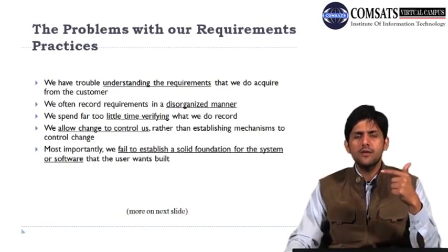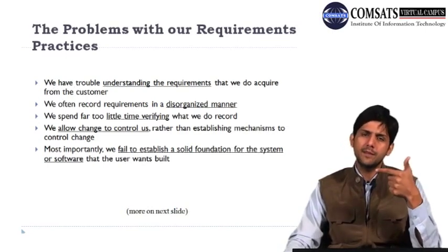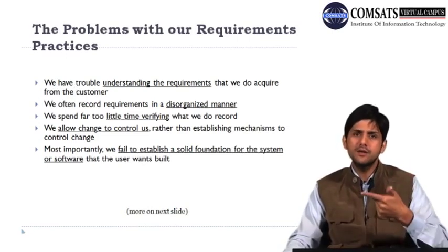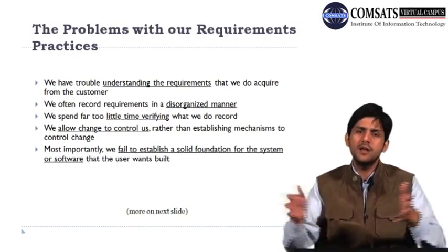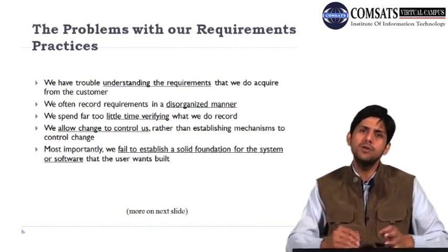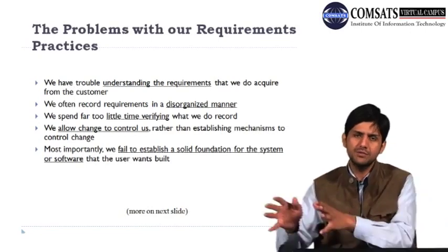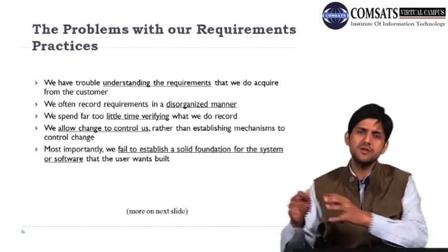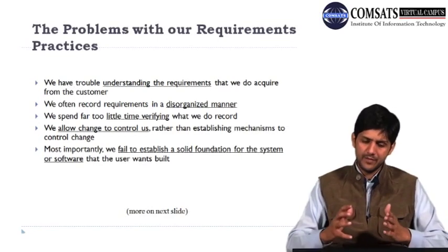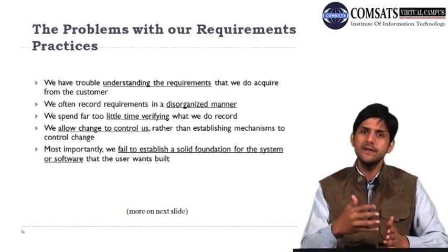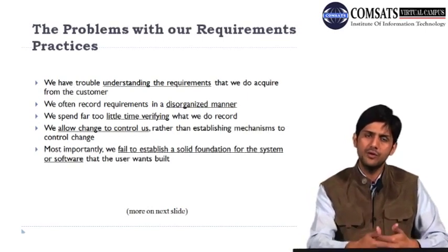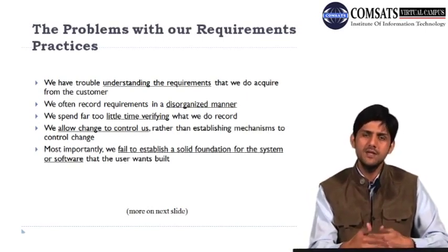So how can requirements be recorded in a disorganized manner? For example, you are making a university management solution, or a learning management system, and you have a students module, a faculty module, a course module, and also administration. When we are expressing requirements, ideally all the requirements related to the students module should be documented together.